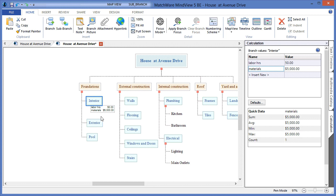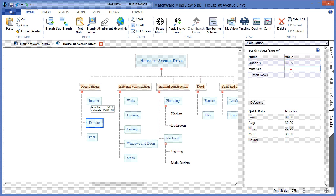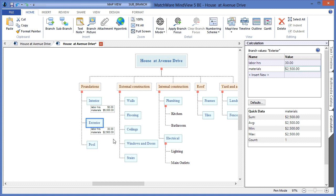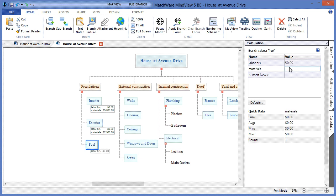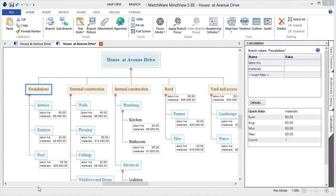I'd continue to the exterior section, utilizing the same features and estimating that at 30 hours, continuing with the cost estimation of $2,500. We'll finish this section off with the pool, estimate the labor hours at 50 labor hours, and an accumulated cost of $25,000. As you can see, utilizing the calculation module, I've been able to estimate labor hours and material costs for each individual task.